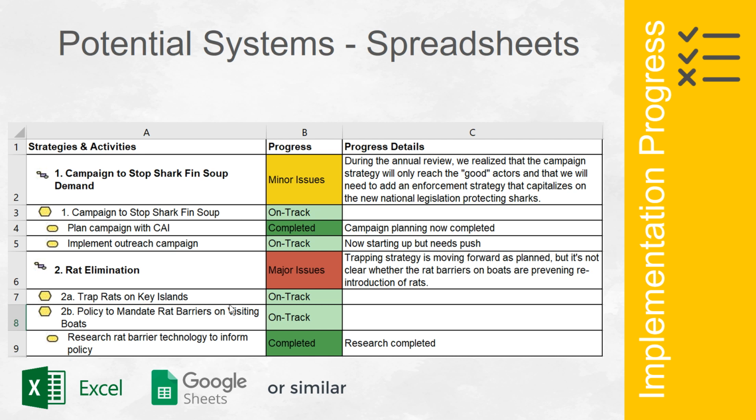The drawback, though, is that you may have project data stored in multiple places. For example, maybe you do your planning in Miradi but move your tracking to Google Spreadsheets. Any changes you do in one place would then have to be manually replicated in the other systems. So you should consider these implications when you're choosing a system.